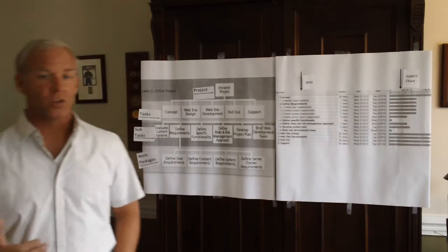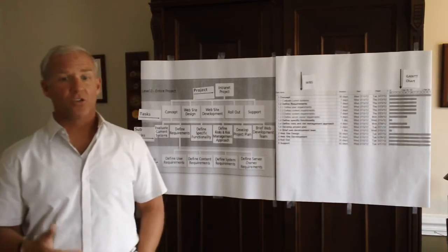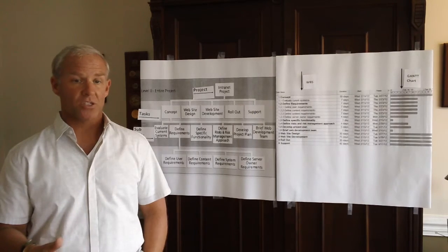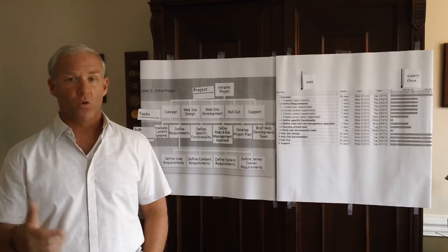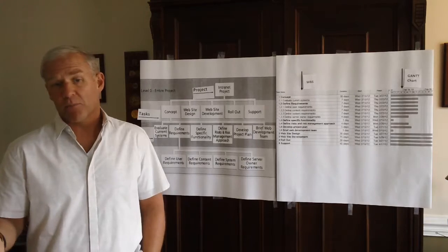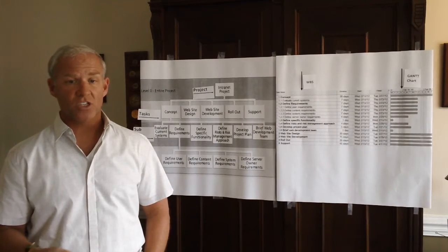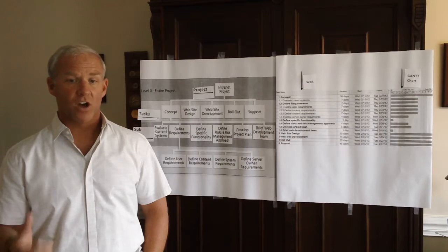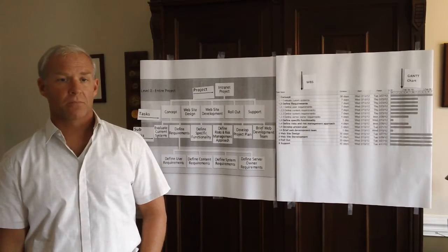Deliverables in the WBS are not part of the project. Assign durations to activities associated with each package in the WBS. Develop the logic for the schedule, in other words, define the predecessor and successor activities for each activity on the schedule. Select report formats for updating and tracking progress.